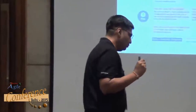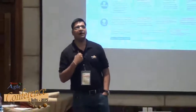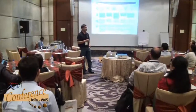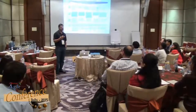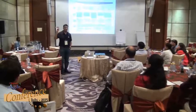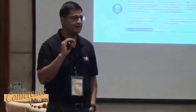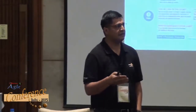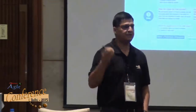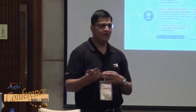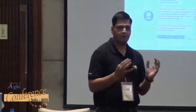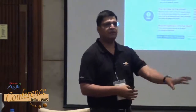One thing that helped in a fast-paced environment: people asked 'You asked me to do sprint planning for two weeks, but an ad-hoc business-critical issue comes — how do I handle it?' Many times people say there are many ad-hoc distractions: an email comes to a DL, everybody reads it thinking someone else will pick it up, because nobody knows the entire module — it was counterproductive. We tried carving out a dedicated team of two or three people only for ad-hoc activities, interchanging them every sprint so everybody gets flavor of it and nobody feels stuck doing only ad-hoc work.